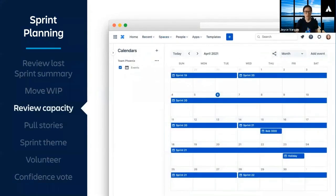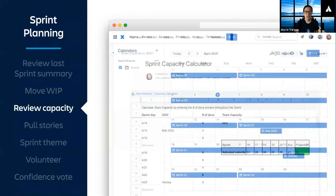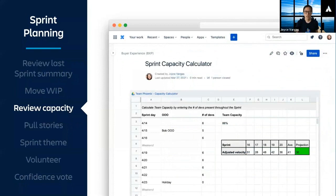Then we look at our team calendar and Confluence to see if we have any known outages in the upcoming sprint. We note those outages in a Google spreadsheet, which easily integrates with Confluence. So we're taking into account things like vacation or a company hackathon, and this gives us a percent value of our expected capacity for the sprint.